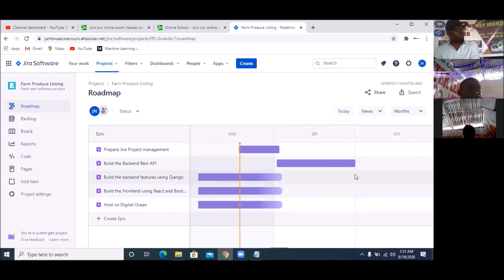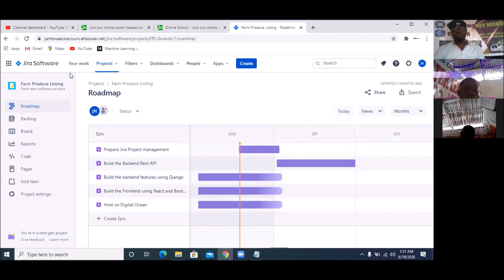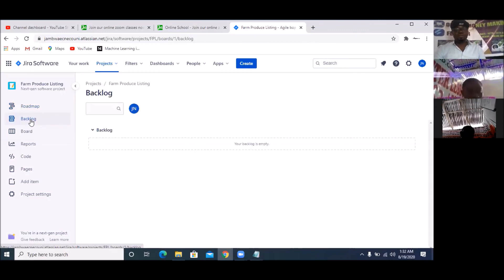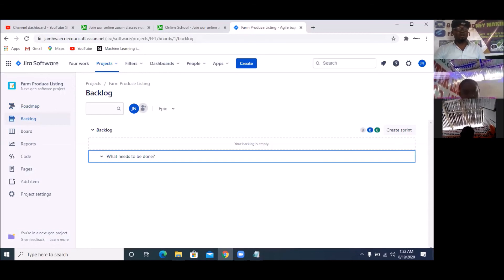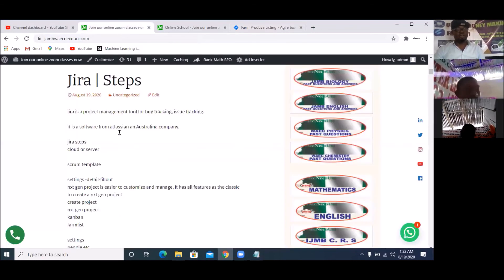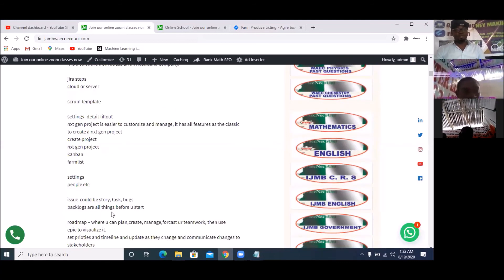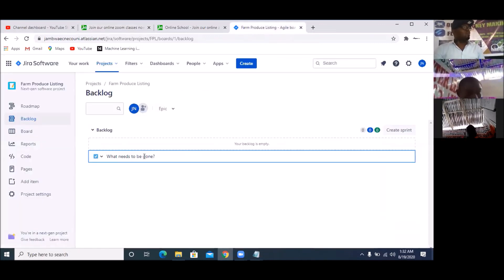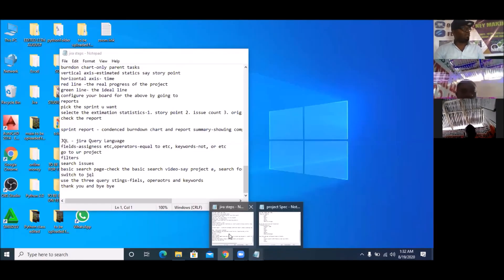That's your first assignment while you go to your backlog. That is how you create your epics. After creating the epics, the next thing is to go to Backlogs. Click on Backlogs to get to Backlog. The procedure we are following is all on jambwaecnecouni.com. So here we are now — it's on Backlog. What you have in your backlogs are what you and your clients have already specified in your project specification.